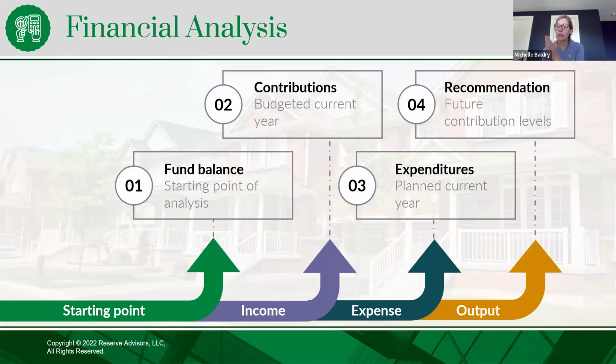We've now outlined the expenditures. So the last variable we're solving for is really that recommended future reserve contribution. So it's a pretty simple formula where we're offsetting those expenditures or those needs by how much you have in the bank today, your current balance plus future contributions.